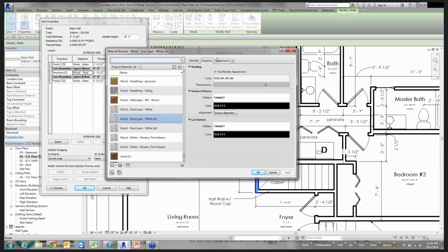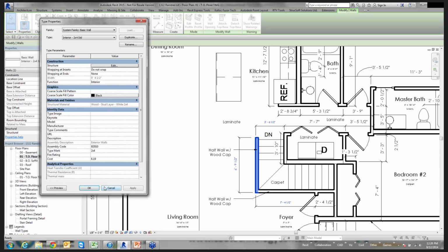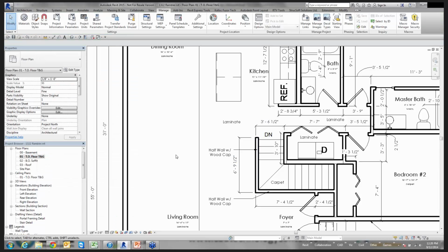But just to show you, if there was a material cost to this information here, I don't have to change it here, change it for my 2x6 studs. I don't have to worry about changing it for the trim, for the chipboard, sheathing, none of that. It's all managed outside like it currently is for everything else, except now it's no longer manual takeoff, so I don't have to count how many walls I have.